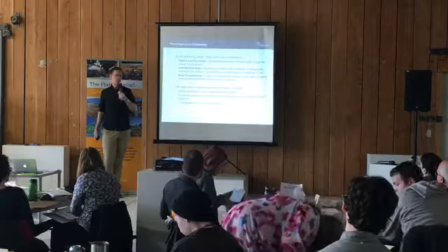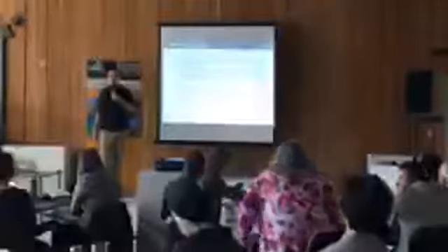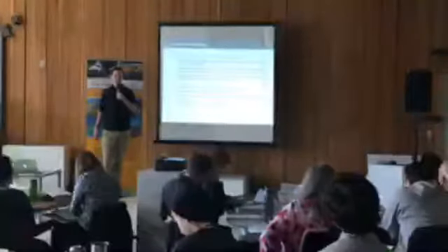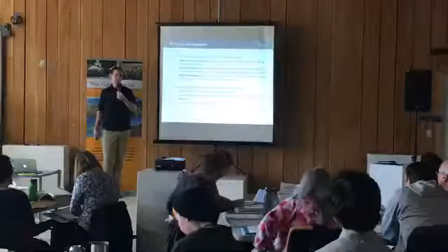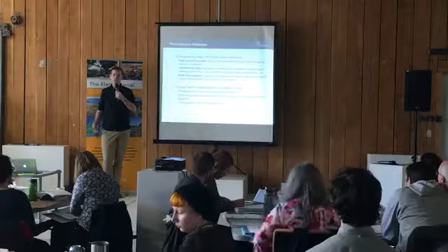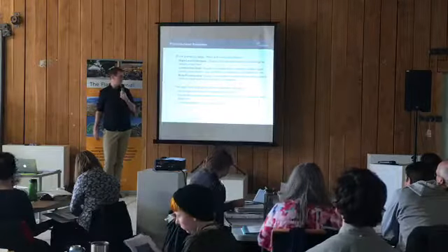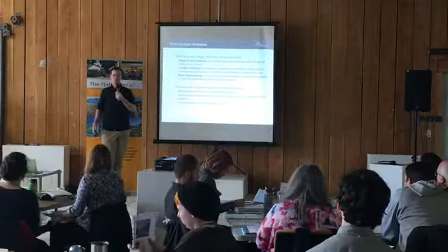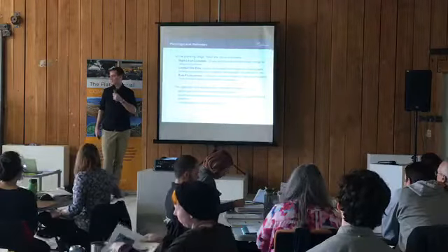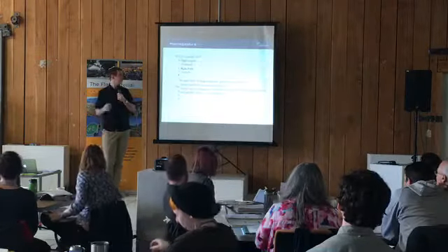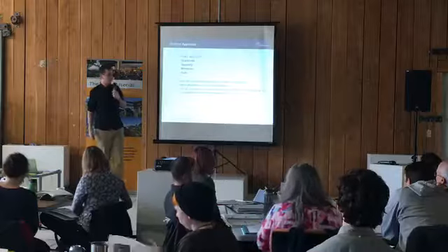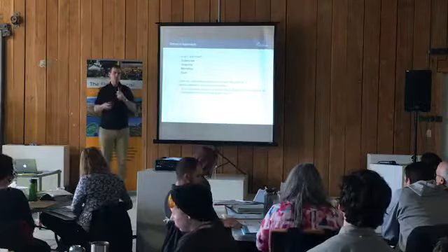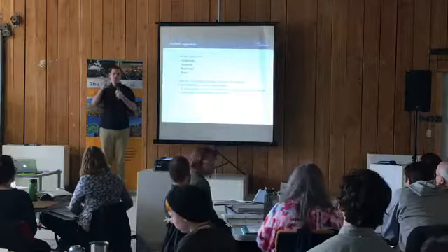So our approach right now is we work with the level of design that we have available. We make a number of assumptions based on judgment and experience with similar past projects where we've run into some similar types of considerations, and then we apply some contingencies to the estimate to account for some of the unknowns.